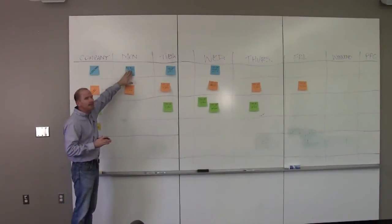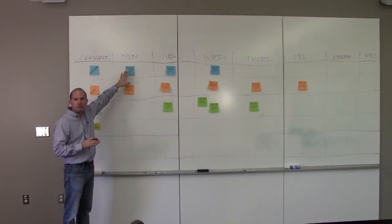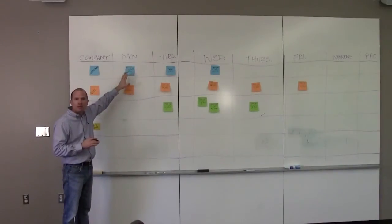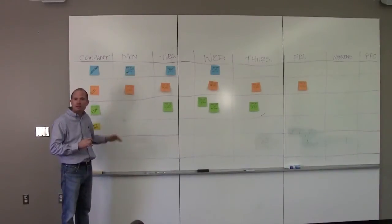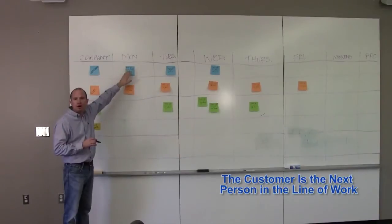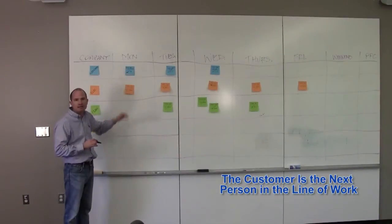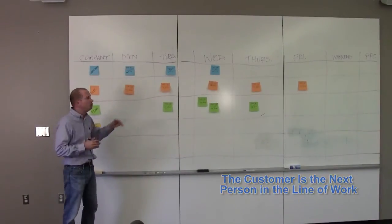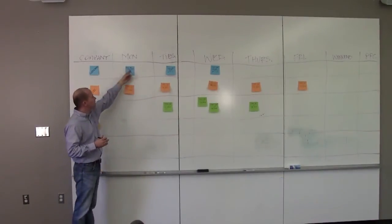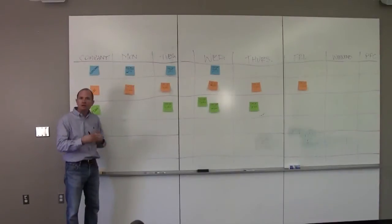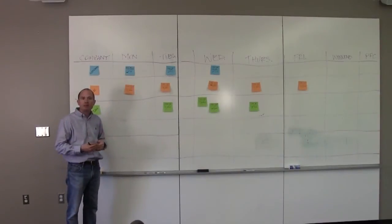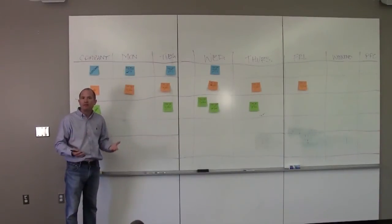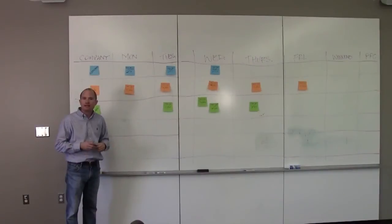So in order to get these truly completed, we need the next person in line to sign off on these tasks. So that could be the person who's using these great beams and confirming that. It could be the general contractor. Maybe they're walking around confirming that they've got it done.